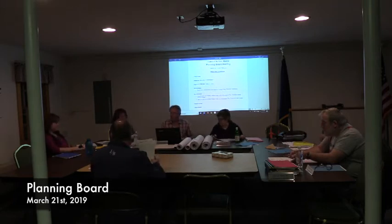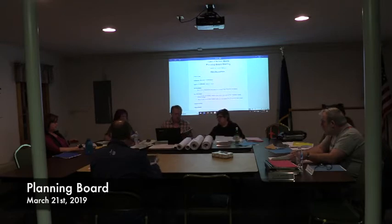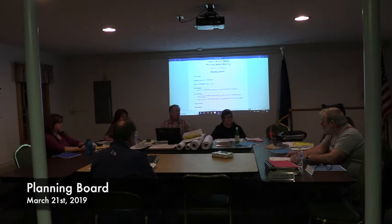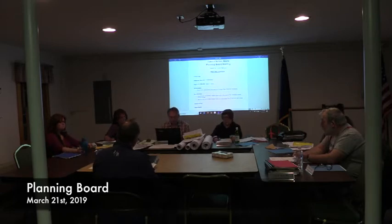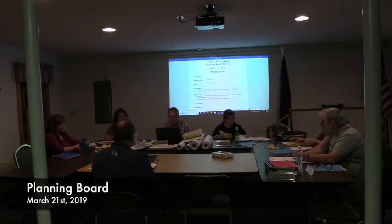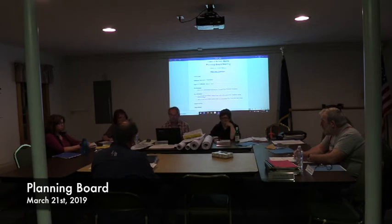So does that mean they're officially submitted and the clock is ticking? Well, it's in the review stage. We just accepted the sketch plan, right? Exactly, very early in the process. Do you think it would be appropriate to come to your next meeting? Once we get it to Southern Maine, we'll get a timeframe on that. If there's any additional information that you can submit electronically, we'll get a timeline from them. At the same time, you'll be working with the DEP trying to get that stormwater site plan going. We've got several avenues going at the same time. But I would say no for the next meeting, but we'll know better once they've got it and they'll start direct communication with you, CCing us all on that too.